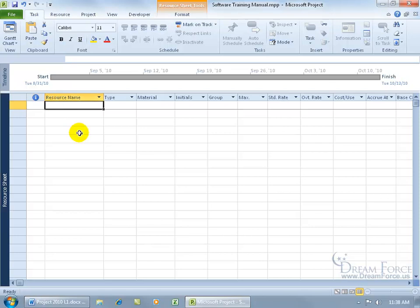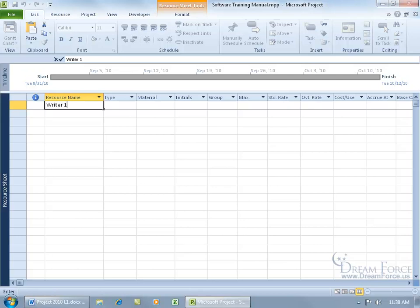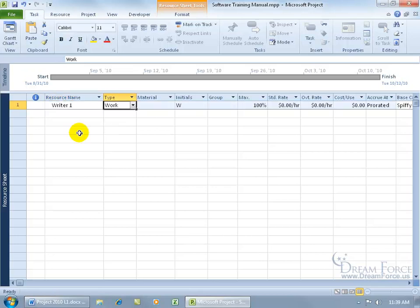And then to the right of that, you've got the resource name. You can actually type in the name of the person, like Bob Smith, or do what I'm doing. You can type in the function of the resource, what they're going to be doing, like writing, so writer1. That way, if I have additional writers, I can label them as writer2, writer3, writer4, and so on. And then when I hit the tab key...